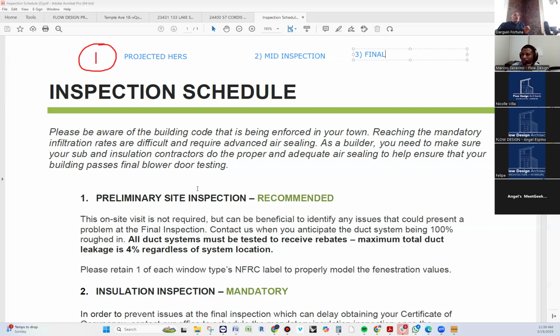If you don't have an energy recovery ventilator in your building, that will be the client's responsibility. They will fail immediately. It's required to have it. You will fail immediately. So that's what we're doing right now in Alberta. If they don't have that, they can't sell the property. They don't get a final certificate of occupancy until they install that. So that's that process. Aren't you glad I took the Home Energy Raters class? I know all this stuff, ins and outs, every detail. So that's it. That's the process right here.